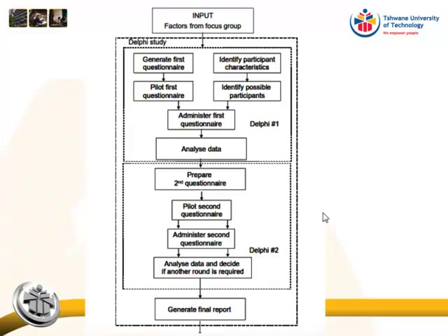But what you can do, if you go from a focus group to a Delphi study, you can already focus your answer more by using the outputs that you got from the focus group. Okay? So let's say that for Kliptown, I do a focus group with the managers of the Kliptown project, and I say to them, how do you think we should measure success? And I do what I did with you guys, but with them, all right? They will probably come up with quite good measures because they understand the project and they are very intimately involved in the project. So I then say to the donors, right, here are the measures that we have already identified. Rate these measures on a Likert scale.